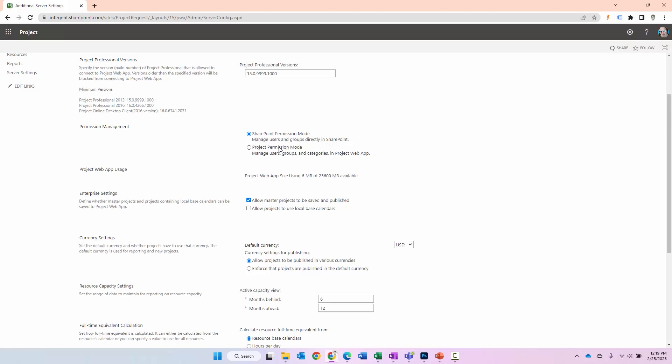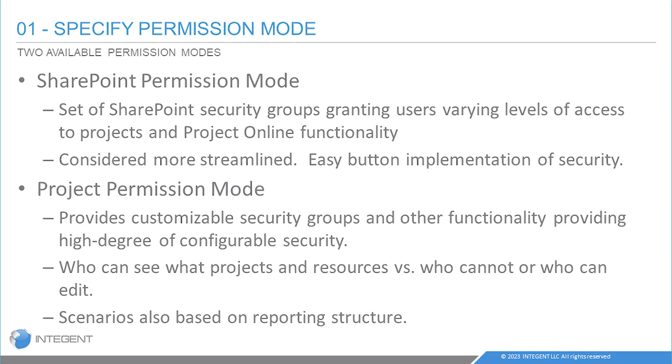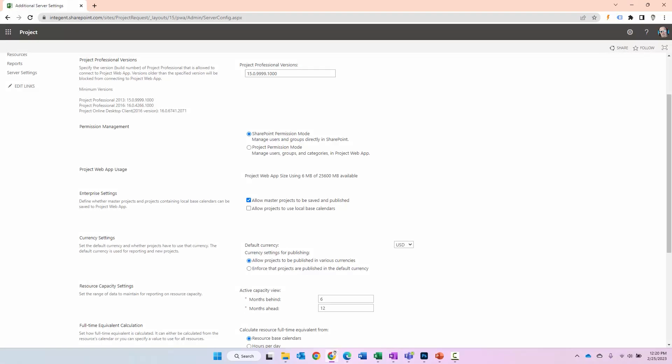Now project permission mode on the other hand provides you a set of customizable security groups and other functionality providing a high degree of configurable security. So consider for a minute, you want certain project managers to be able to edit some projects but not other projects. Maybe you don't even want them to be able to see other projects. But then again, you have other resources who should see and edit all projects. So there can be varying types of requirements with regard to visibility, editability, and even seeing it all projects and resources. And then there might be scenarios based on reporting structures within the system too. These are all things that can be handled via project permission mode.